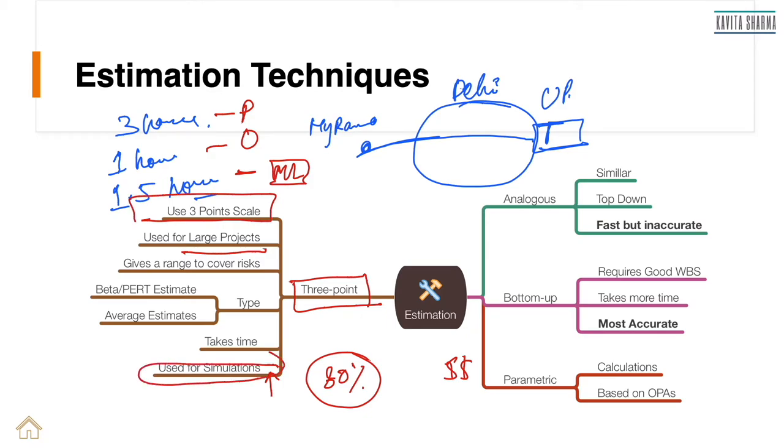What is confidence level? I am 80% sure that the project would be completed within this much of budget. That can be arrived only when I have three point estimates. And I use simulation software. Now, because I'm using three point estimates, it takes time. But it is worth investment of your time because then nobody's going to come and catch you that you have said 40 days, you said 80% confidence level, this much of duration or time and this much of cost.